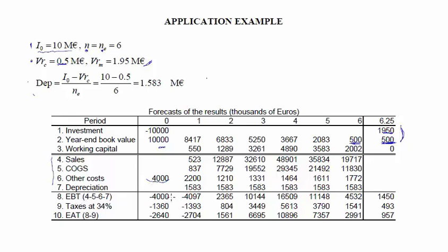Well, but we have here these negative values, and we calculated also what is the meaning of this. So we are assuming that this project belongs to a company which has other projects that are running. So they have profits in this year. So this will reduce those profits, so will reduce the tax they will pay. So a negative tax here represents a saving in taxes in other projects. That's why we present it here.